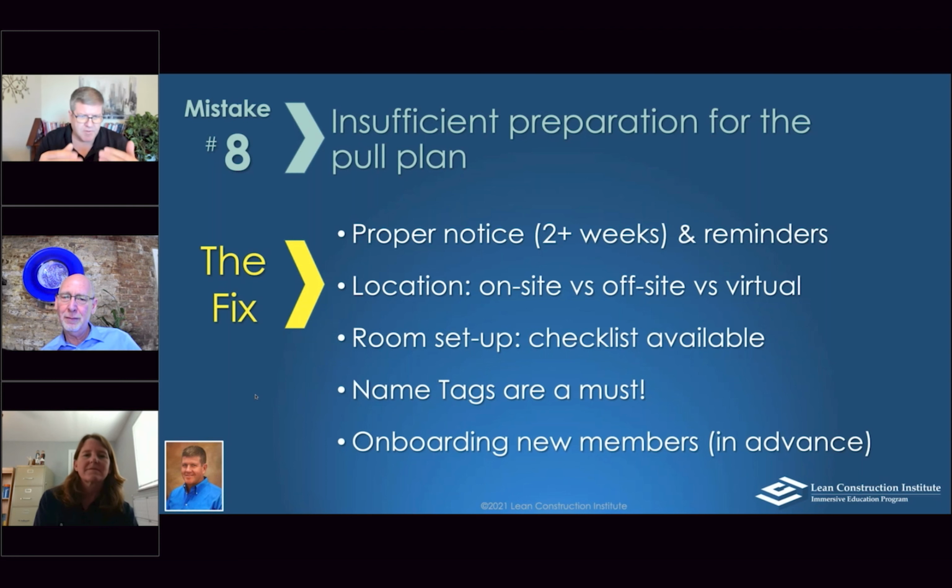The only problem with virtual is sometimes you get people on phones or iPads and they're out on a site and they're not really conducive to being in there manipulating the pull plans and things. So making sure that people know that they're going to be required to participate on a PC or a laptop and should be on a wired connection is important as far as the location.